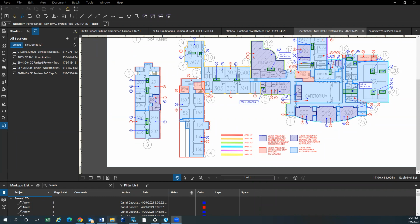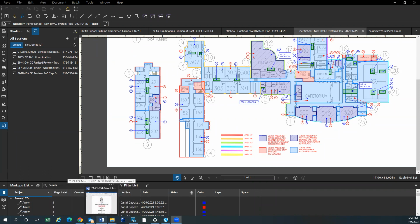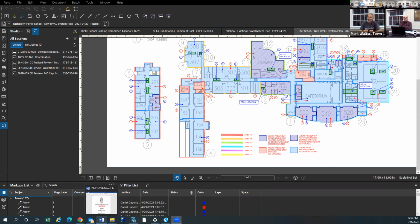But the problem, I think Larry pointed it out about the contractors, is that even the engineers are kind of busy, and we have a very, very short time frame. Right. So that design bid spec would have to be pulled together very quickly, get a designer on retainer, and then get a referendum that authorizes a dollar amount. Then once we get a design and put out the bid, we'll see whether we're within that range for what we authorized.